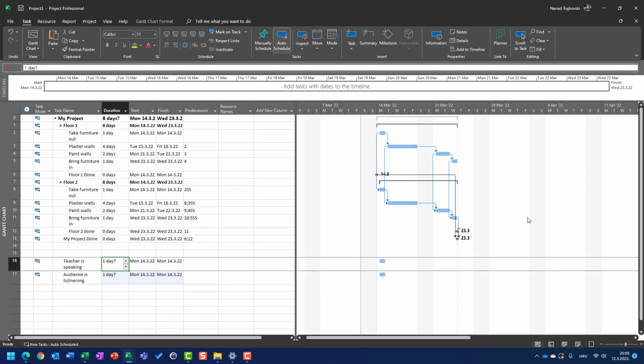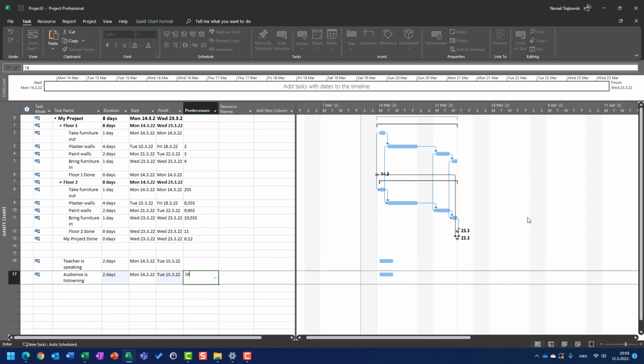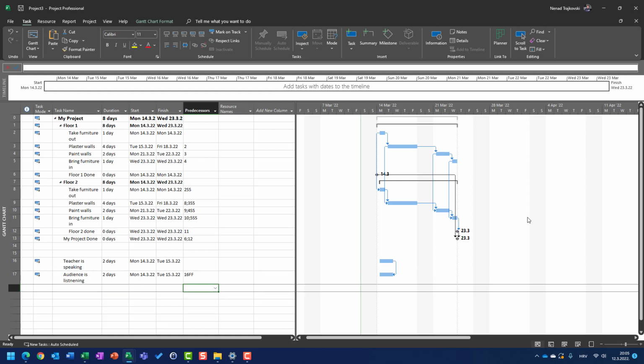And then let's say I'm lecturing 2 days. I can go here and I can say 16FF, finish to finish, which means that you are supposed to finish with listening after I'm finished with speaking.